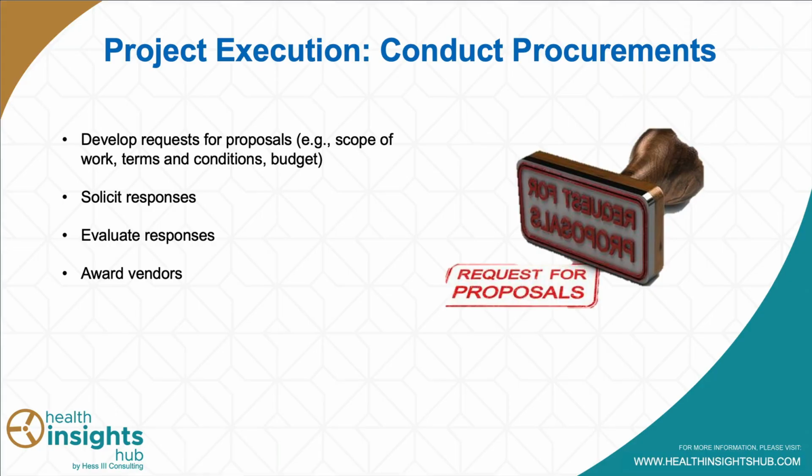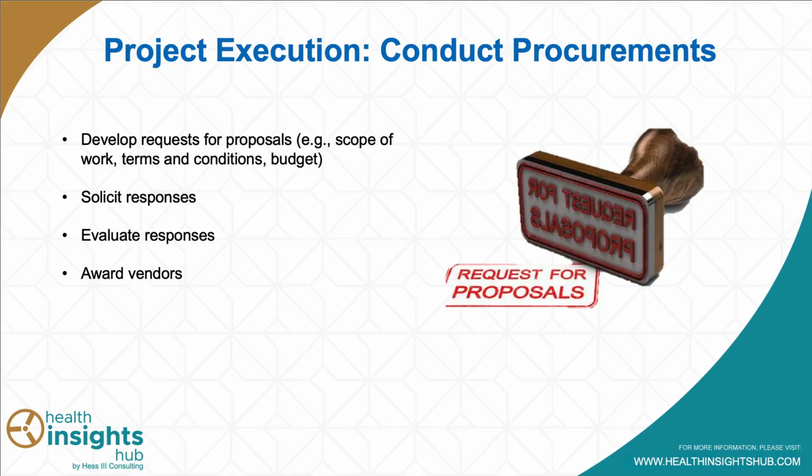But if you do need to go through the longer process of creating a request for proposal and writing out a scope of work and the terms and conditions and creating a budget and defining that evaluation criteria, this would, and should be, several days, weeks, maybe even a month's worth of work, depending on what you're working on, again, the scale of it. And so you want to develop that response or that procurement.